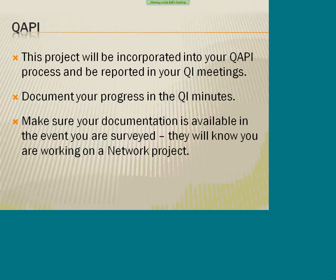So, for instance, you're going to have a report. We attended this kickoff meeting today. We completed our action plan. We submitted that. We've started on steps 1 and 2, and we've completed step 1. By the next meeting, our focus is to have this step done. And that needs to be in your minutes, because when the surveyors come in and they know you're in a project, they will ask to see documentation that you're doing it, and the documentation comes in your QI minutes.